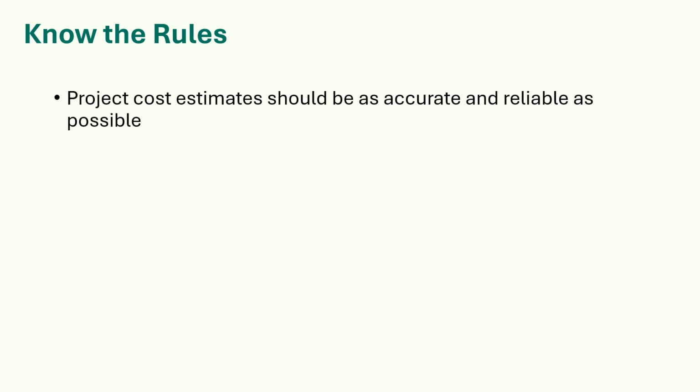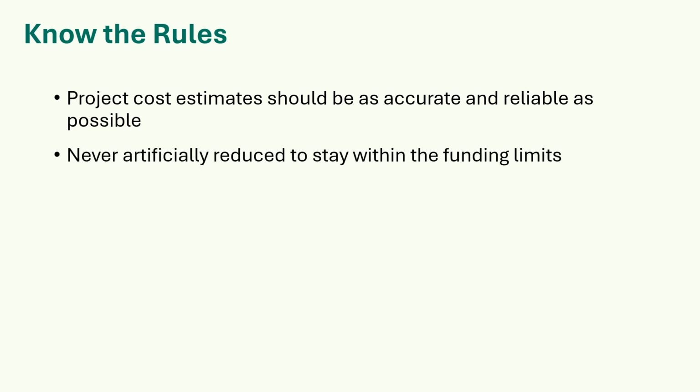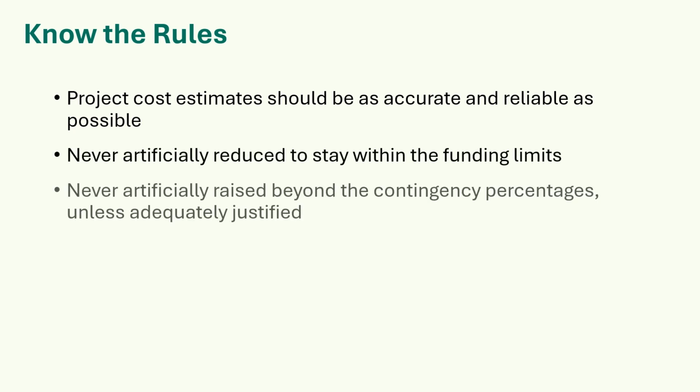Project cost estimating. Know the rules. Project cost estimates should be as accurate and reliable as possible. Never artificially reduced to stay within the funding limits. Never artificially raised beyond the contingency percentages, unless adequately justified.